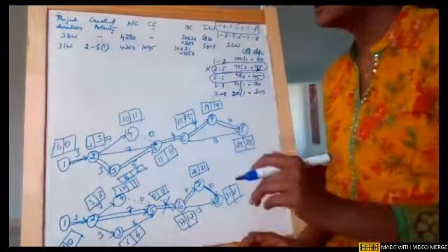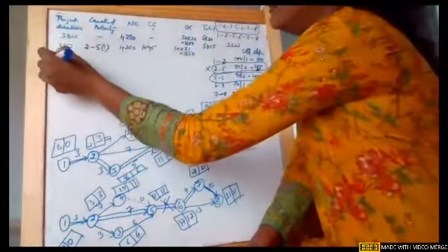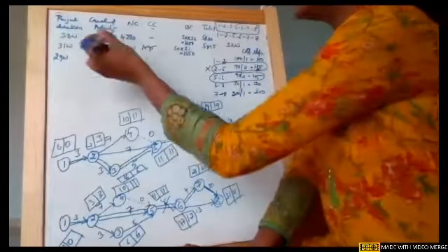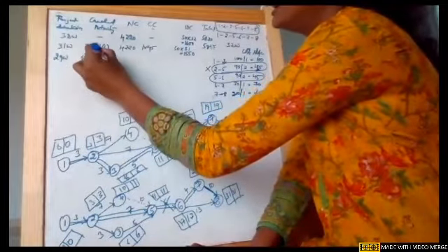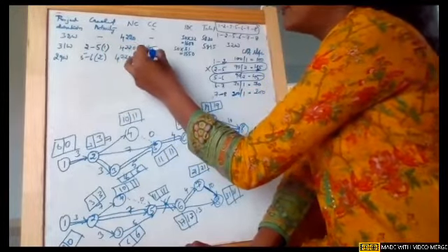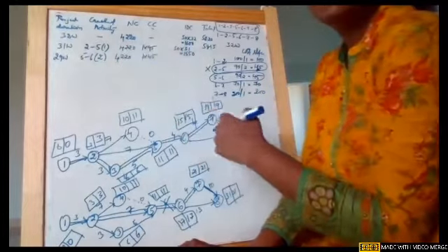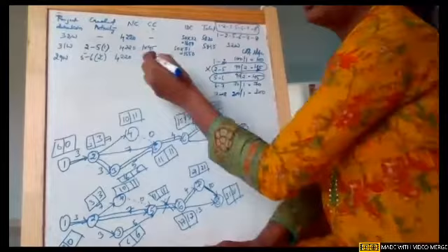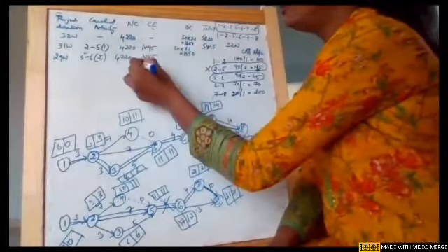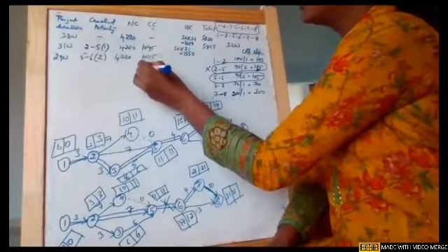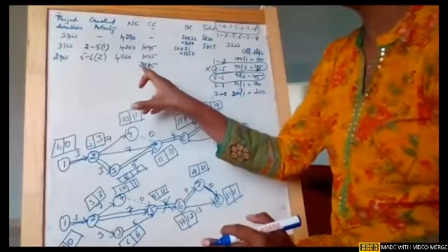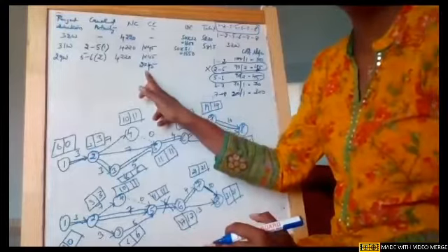So just check the cost. 29 weeks. Okay, and the activity which is reduced is 5 to 6. So because of this, how many weeks total? 2 weeks it has been reduced. So 4 to 20. 1 into 45 will be remaining same, because one activity which is crashed, we are again applying for the next activity to be crashed. Okay, so after that, 2 into the slope for this is 45. 1 week into 45 is for the first activity, 2 to 5 which has been crashed. Now 2 into 45 is for the new activity which has been crashed by 2 weeks.